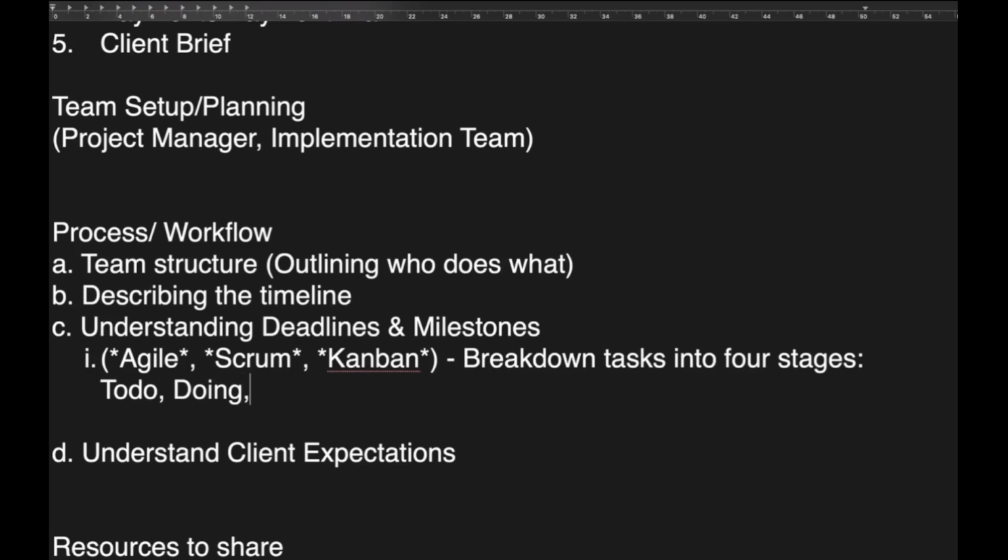These stages would definitely be: to do, the task you have to do; doing, the one you're currently doing, which most people also refer to as progress; then review, or for review, the tasks you have for review; and done. This is something that really works for us, so I think it might also work for you.